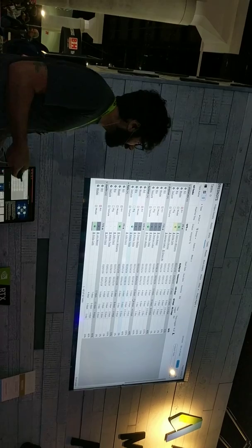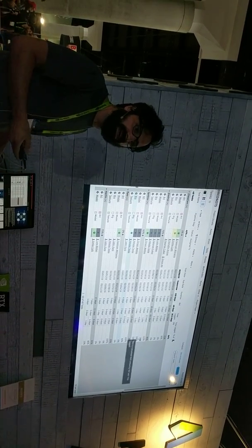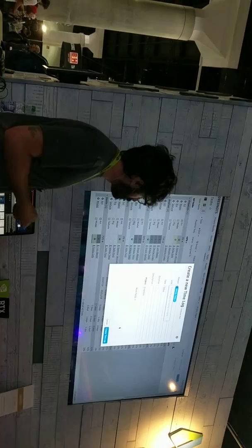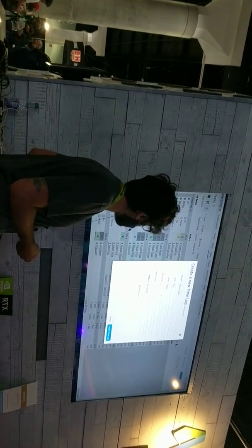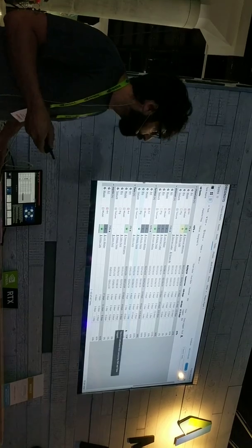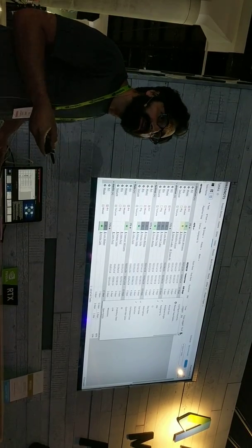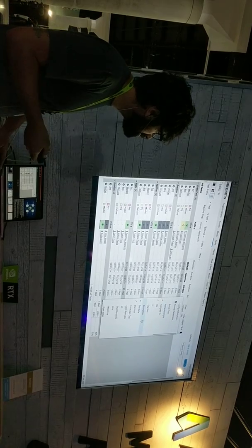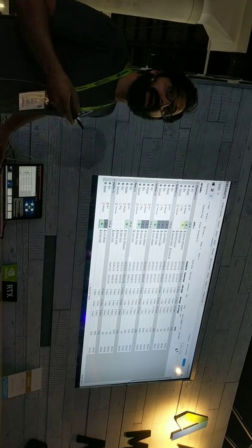But now let's look at how to calculate this data. I'm going to log a day of work against a task. But how much does that day of work represent in terms of money? If I add a custom field and call it day rate, I can then fill in an estimated amount that each of these tasks costs per day.